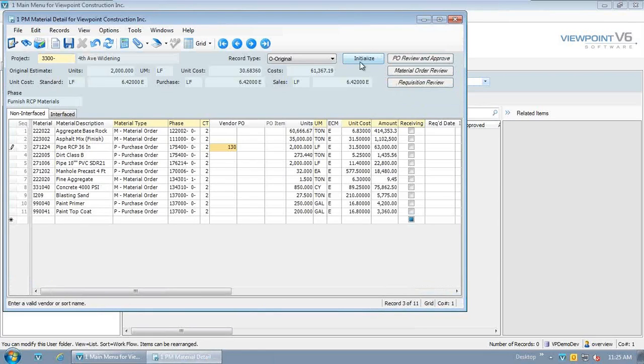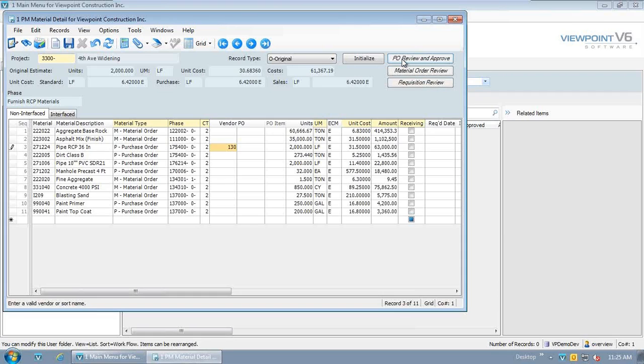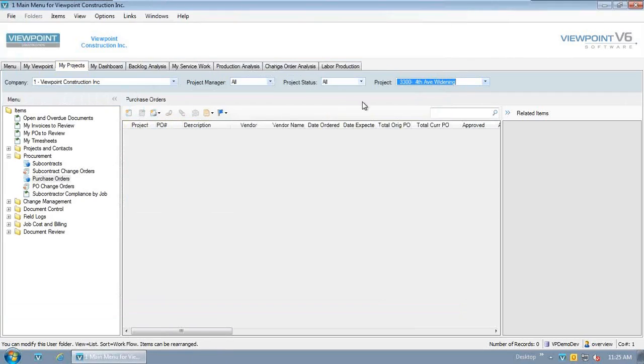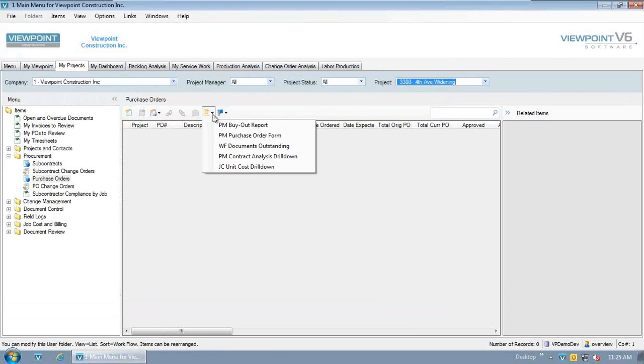And when you're ready, you can have Viewpoint generate that purchase order for you. It will create a commitment on your project. If there's a review and approval process based on hierarchies, you can build those tools in as well. So getting materials and subcontracts allocated is a straightforward process. Here's my list of items that I'm required to purchase provided by Hard Dollar. And then I'm able to go on through and start managing my job.